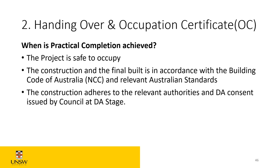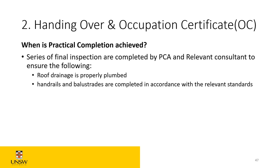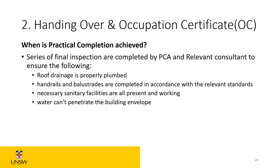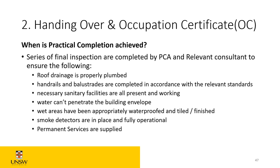There should be a series of final inspections completed by the private certifier or council and relevant consultants to ensure: roof drainage is properly plumbed and not leaking; all handrails and balustrades are completed according to relevant standards; all necessary sanitary facilities are present and working; water cannot penetrate the building envelope and all wet areas are properly waterproofed, tiled, and finished; smoke detectors are in place and fully operational; permanent services — sewer, water, electrical — are operational; and a final survey inspection has been completed.